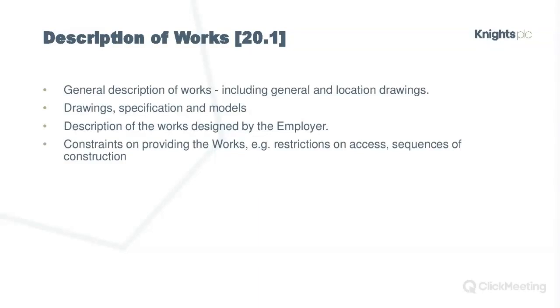So again, if there's an ambiguity with the contract document or the works information, you might find that your caveats are of little effect. So that's the first point. And also, those clauses, the caveats, need to be drafted properly and incorporated into the Z clauses, so the amendments to the NEC.